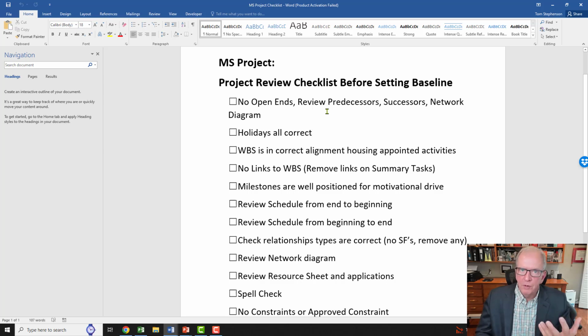If you've been watching my videos from the beginning, it's very important to make sure that you review and that you don't have any open ends. Make sure that all your holidays are in. Make sure your WBS, your work breakdown structure, is in the correct alignment. I'm always getting people where it's not in the correct alignment, and that throws off your dates. That can be a big problem. Milestones are well positioned for motivational drive, and I'll show you how you can look at that across the top of your screen.